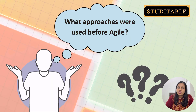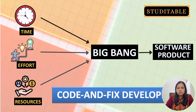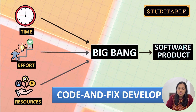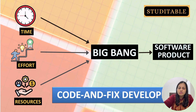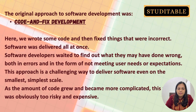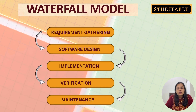What were the approaches used before Agile? Agile was introduced around 2000 and 2002. The original approach was code-and-fix development, also called the Big Bang, around the 1950s, where the entire project was created all at once — involving a lot of time, effort, and resources. Then the waterfall model came in, following the cycle of requirement gathering, software design, implementation, verification, and maintenance.